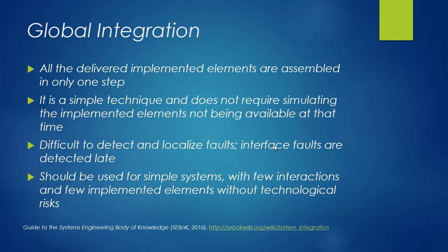Since all elements are assembled in one step, it will be hard to detect and localize the fault. Actually, some faults might be detected late in the process. This technique should be used for simple systems with few interactions and few implemented elements without technological risks.